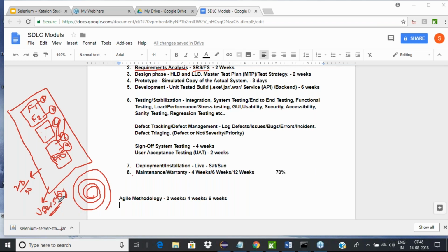When you can accept this criteria, when the order is going to be cancelled successfully, when my payment is returned back into my account, at least the payment transfer request has been initiated, because those banks and your system will take 2 to 3 working days to get your money back. So that is ultimately the end goal, but from a software point of view, we'll say when the payment transfer request has been initiated, something like that, that's your acceptance criteria.